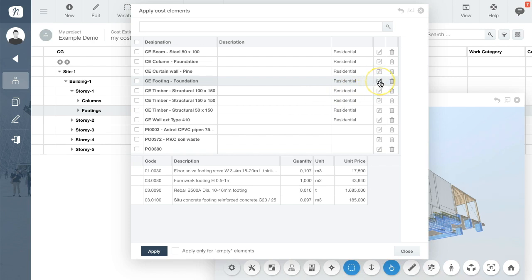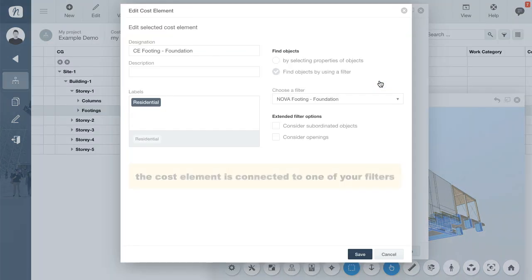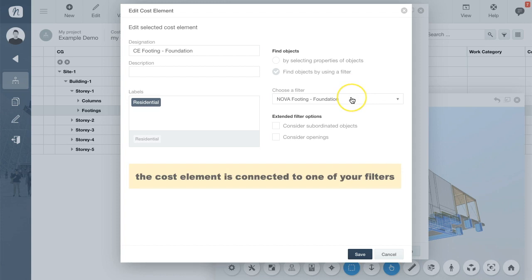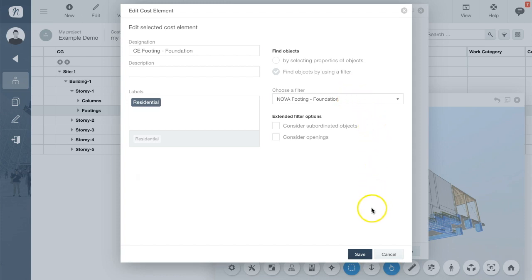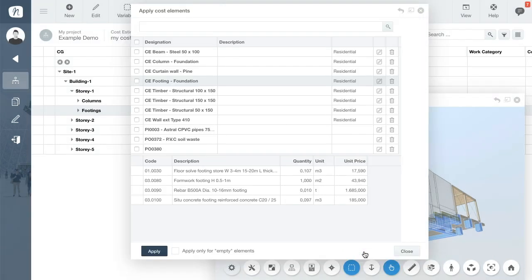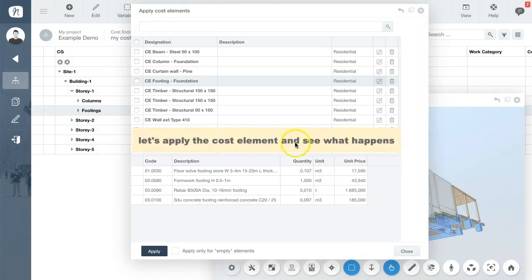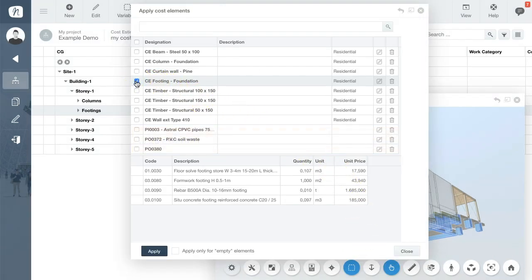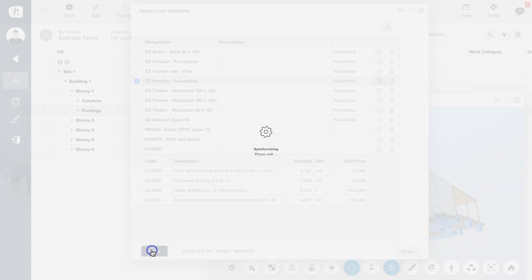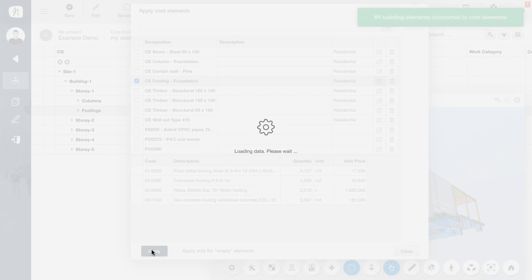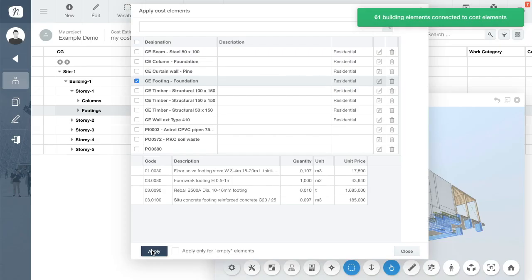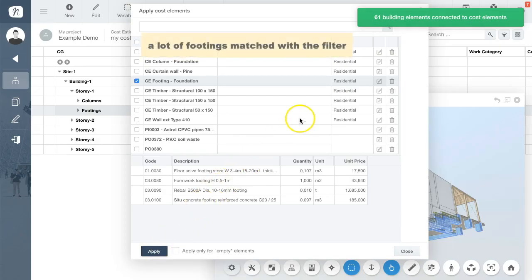At the same time, the cost element, if we click the edit icon, is connected to a filter and to component properties. So let's select and apply the cost element to your project. NOVA is now identifying all building components that correspond to the cost elements filter, and the work items linked to the cost element are assigned to the building components.